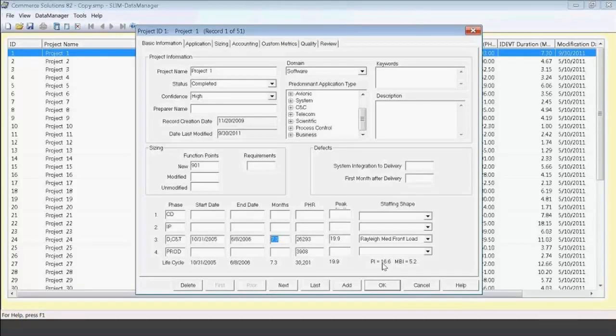And the beauty of this is we can mathematically calculate it, so we can take the subjectivity out of this measure. The higher this number, the better, right? This is also going to be determined by the type of application. So if I'm doing business software, those PIs are going to tend to be higher than if I'm doing command and control or avionics types of systems or more engineering types of systems. So keep this in mind as I go through the seminar, or the presentation. Once we get functional size, duration, and effort, we can calculate our efficiency, or we're calling it a productivity index here. This is going to be a big factor in the success of our estimating program.